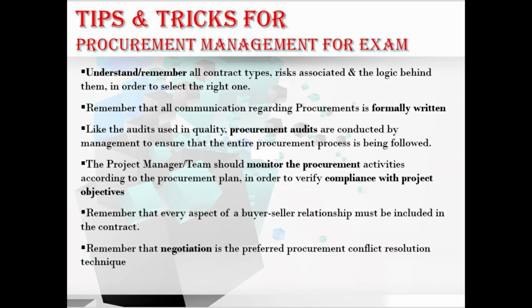And we need to remember that all the communications regarding the procurements are formally written, and like the audits used in quality, procurement audits are conducted by the management to ensure that the entire procurement process is being followed. And also, we have to remember the key point that the project manager or the team should monitor the procurement activities according to the procurement management plan in order to verify the compliance with the project objectives. And also, we need to remember that every aspect of the buyer-seller relationship must be included in the contract.